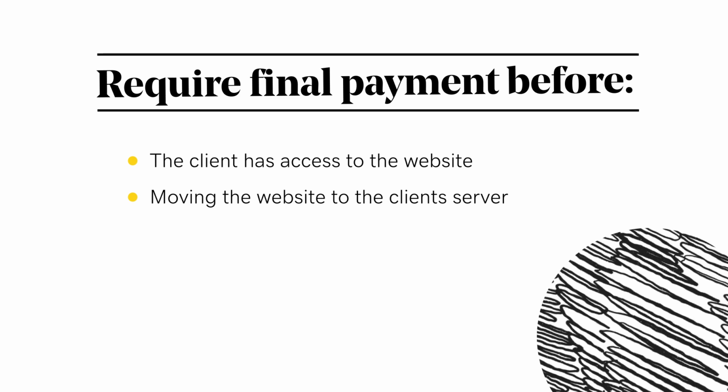If the client wants access to editing the website before the website is live to the public, you still need final payment. To allow their edits before the site is public, move the site to their new hosting, but don't point the domain's DNS records to the new web host yet. This means you've been paid, but only one step, pointing the domain, is required to taking the site live.